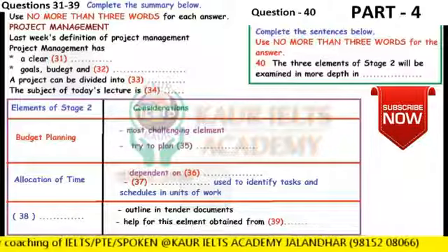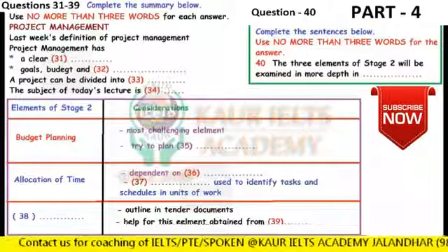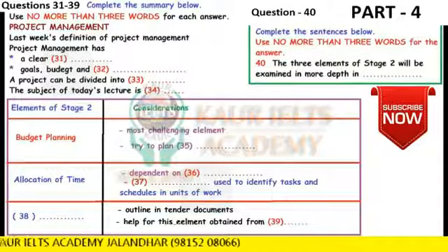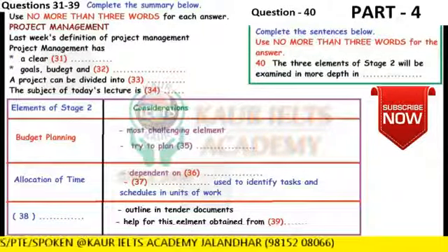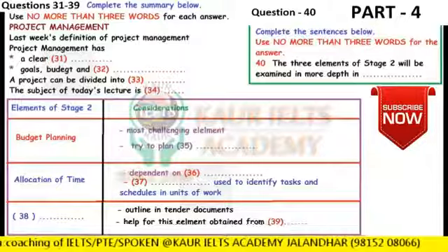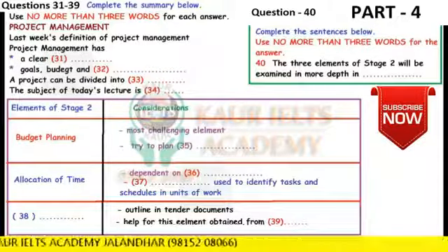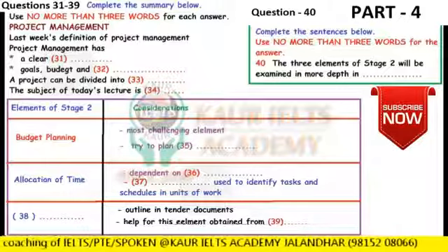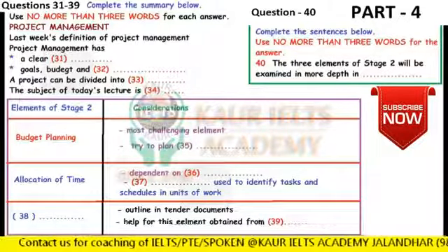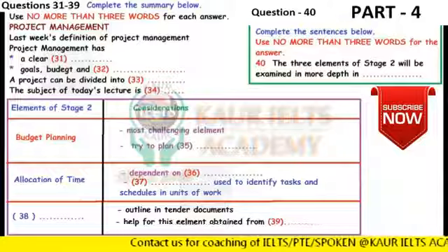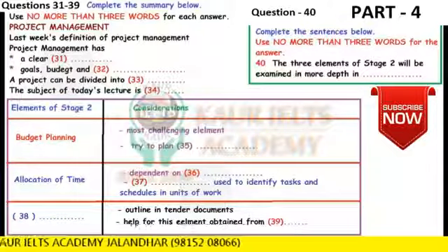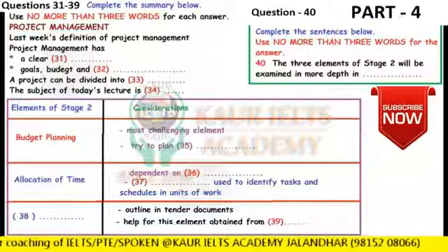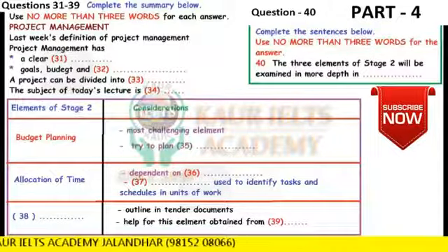The second stage of planning is the allocation of time to a project, and for this you'll have to canvass others for help. Only by asking the advice and opinions of those with expertise in the field will you be able to establish the size of each unit of work to be completed and the order in which those units of work should be carried out. Remember that some units of work may be done simultaneously, but many cannot.